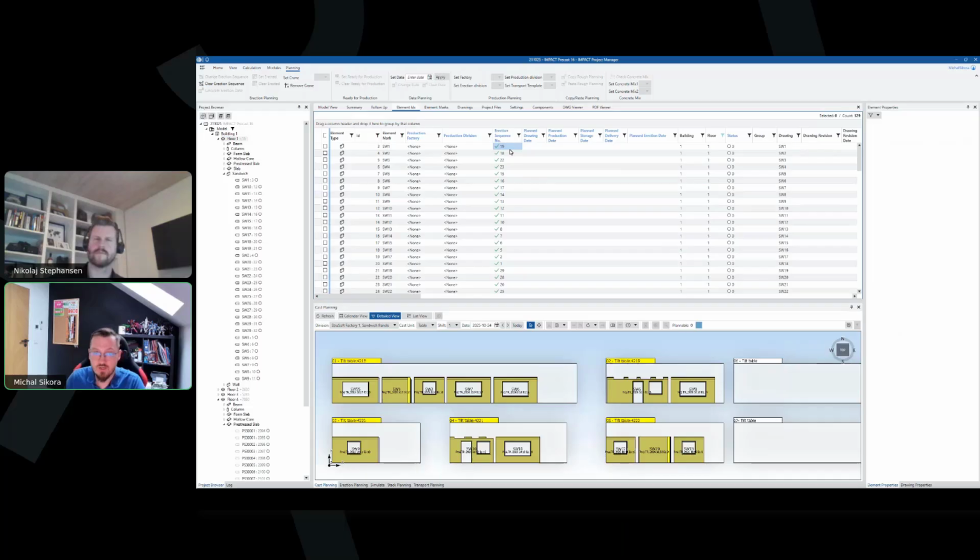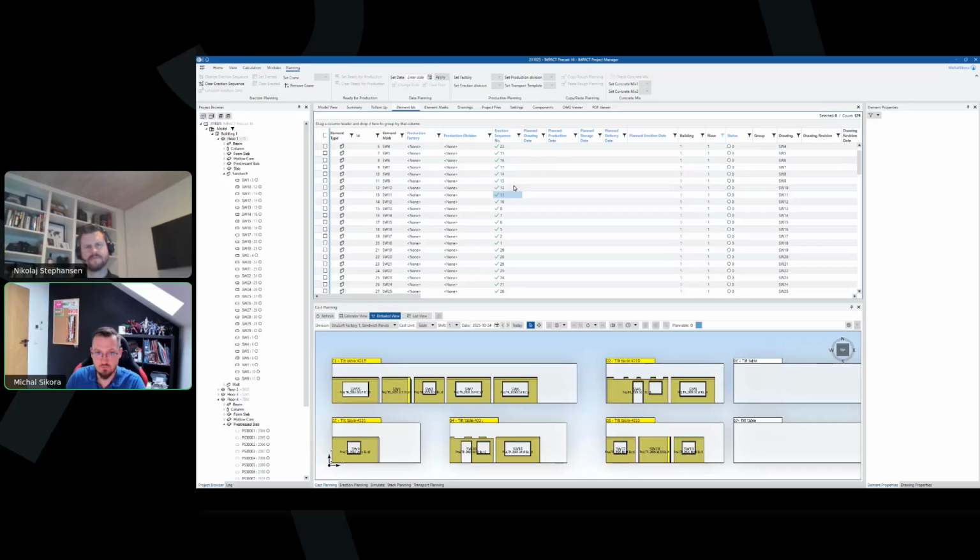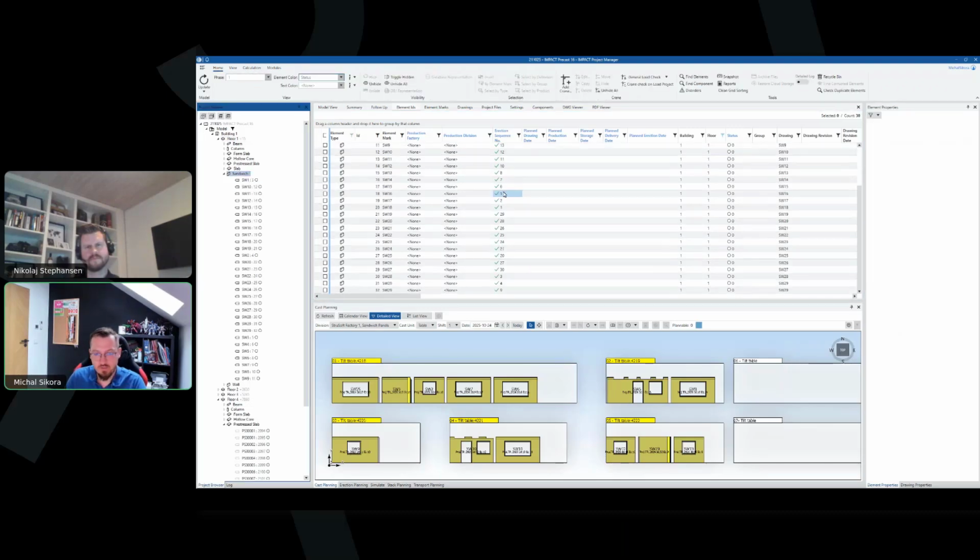So not only the erection itself, but unloading the elements on site or maybe building up the elements straight from trucks has importance in the process in your particular case. So that's where erection planning is also important, as you can plan the other processes through that erection planning. So your storage and your transport as well, and loading of trucks according to that erection sequence or reverse erection sequence. Right. So going back to just sandwich panels for a moment,